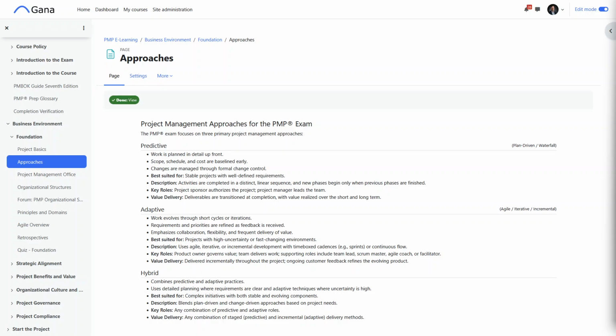Okay, so what is that? That would be something similar to a construction project. You might be building a house. Okay, we've built the house many times. We have plans for it from previous construction projects. We can sit down and estimate exactly how much it's going to cost. We can build a schedule because we know what it's going to take, how many resources we're going to need. We'll be able to plan everything in detail all the way up front. That is a predictive project, right?